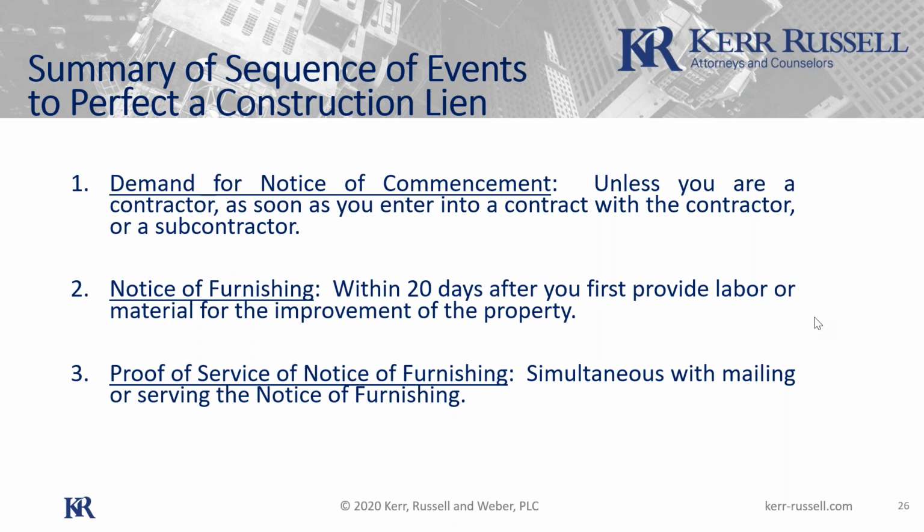But again, if you want to simplify things, you can send the notice of furnishing before you get the notice of commencement. You can figure out who the owner is. I mean, usually you know it's Tiffany's that's having you do a build out, and you have an address for them. So you can send a notice of furnishing even before you get the notice of commencement back. All right, the third item is that proof of service of notice of furnishing that you need to fill out and keep in your file that we went over. Okay, let's keep going.